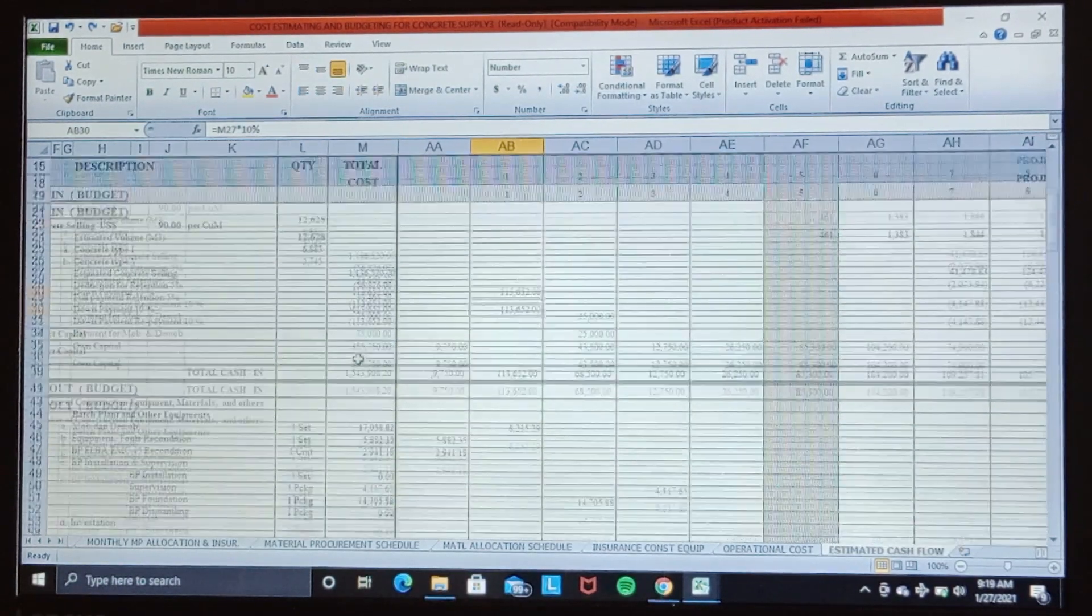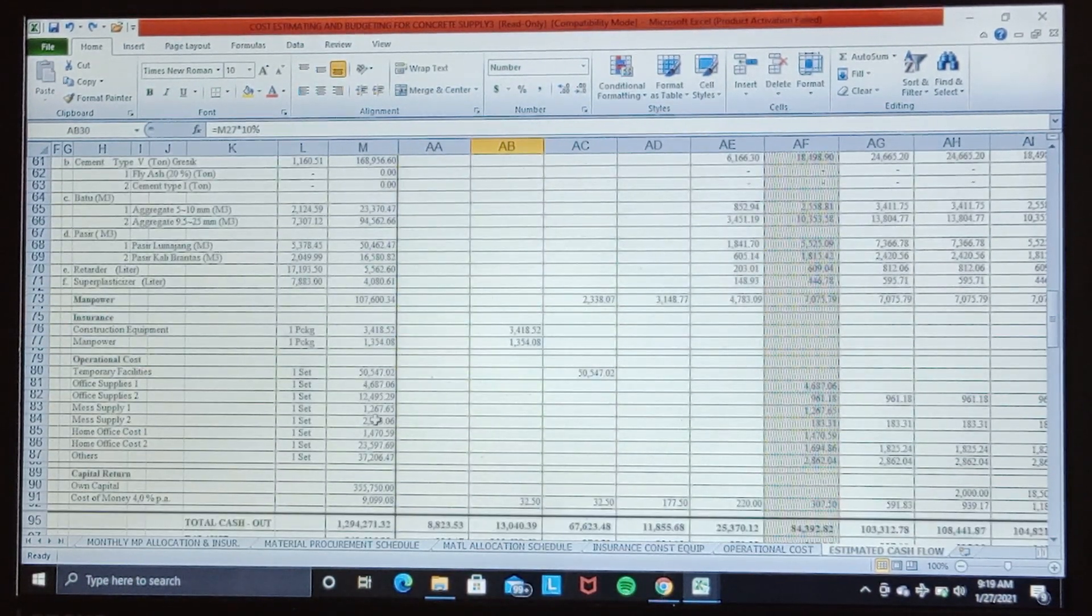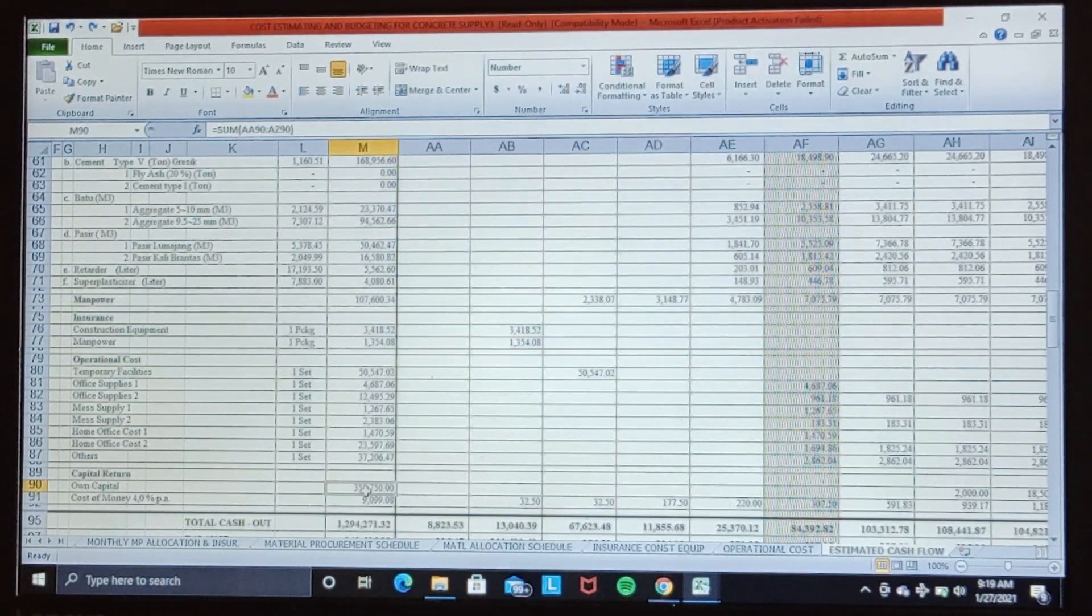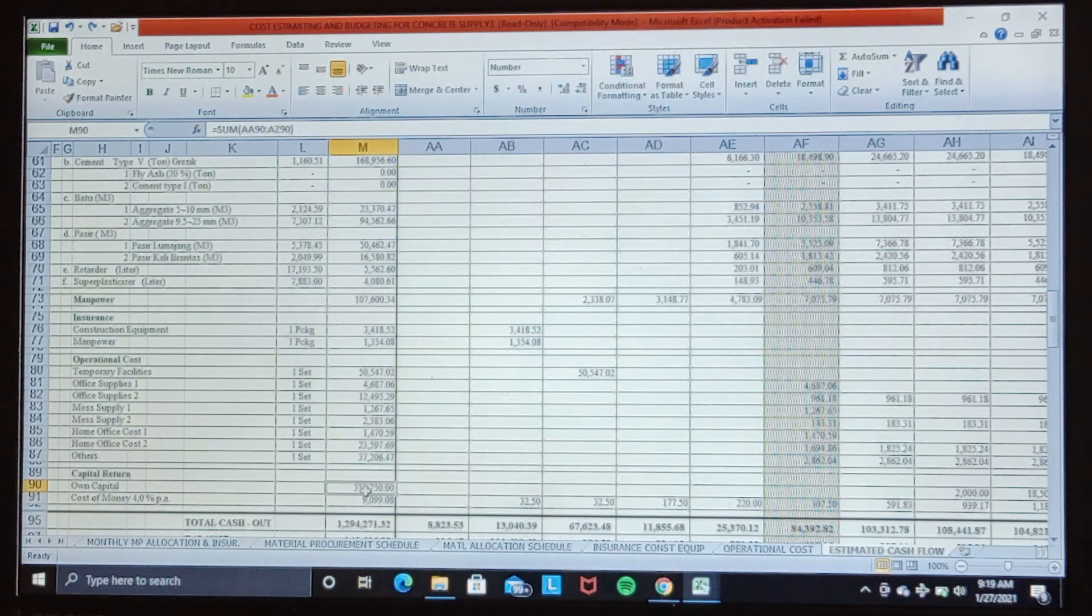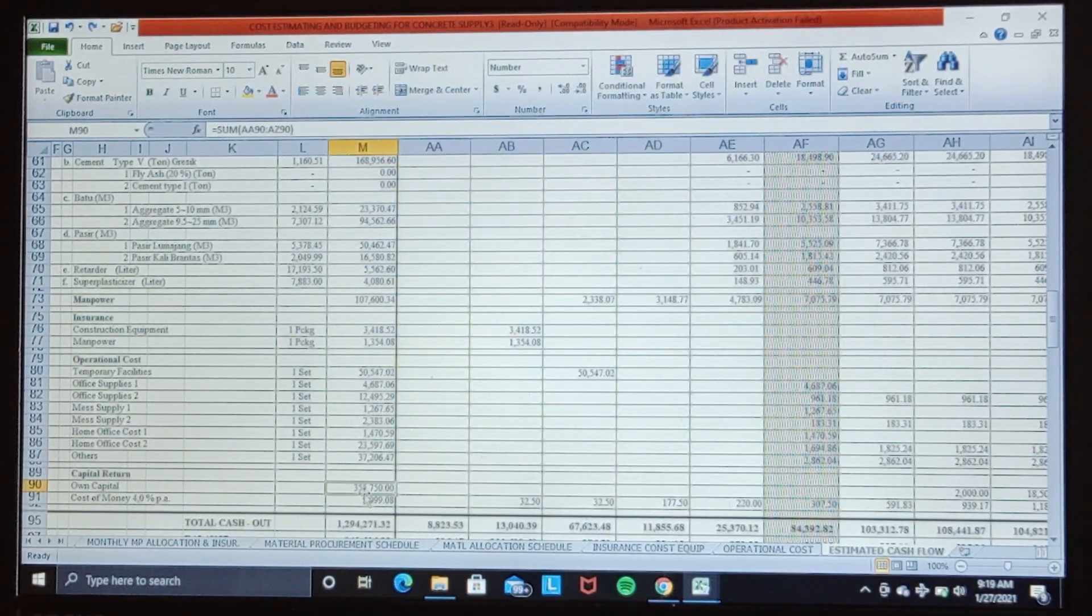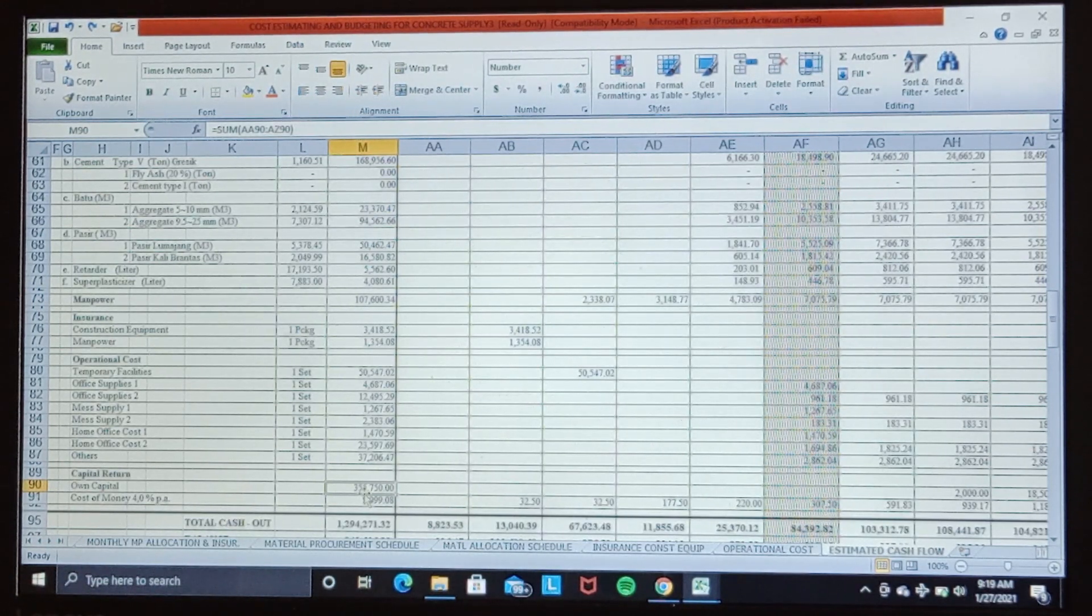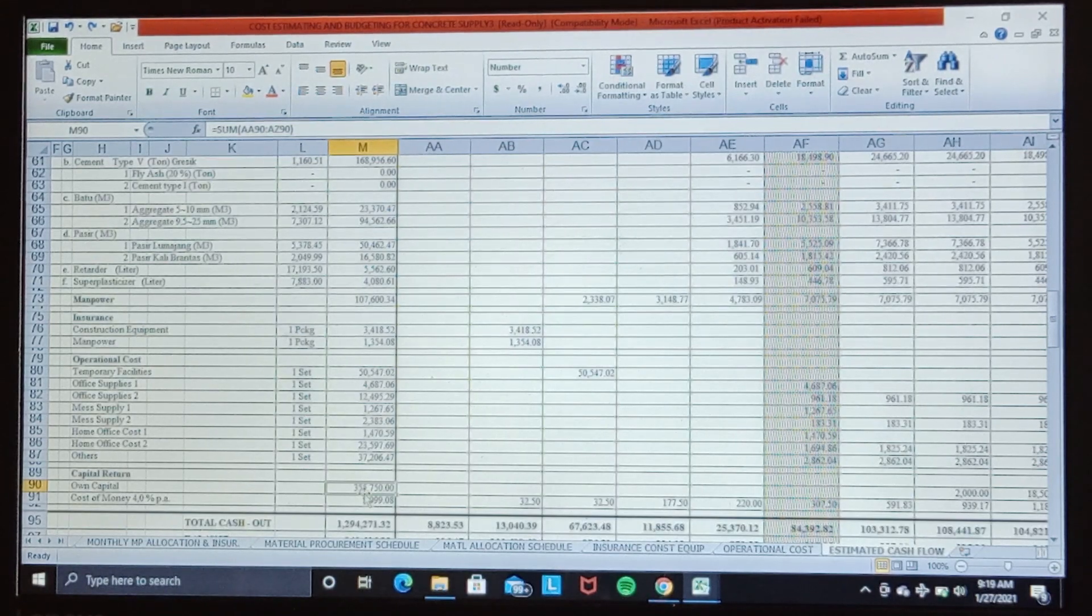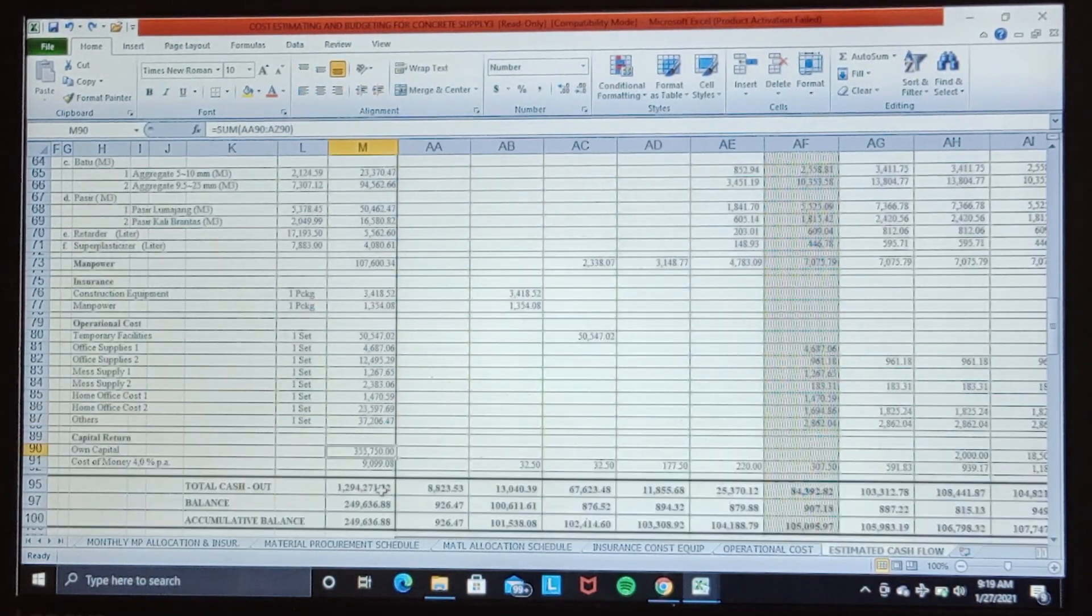This project loan, and we pay back with cost of money. We apply only 4% per annum for cost of money. This is actually a hidden project profit also.